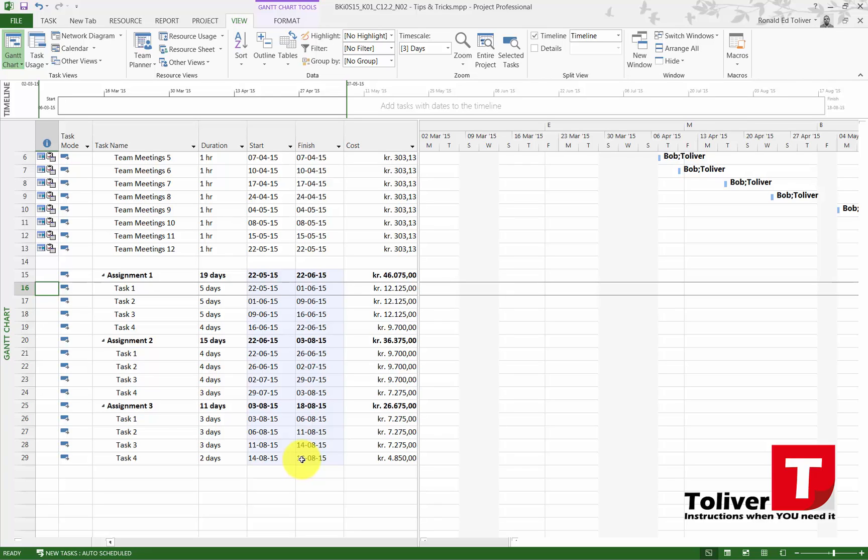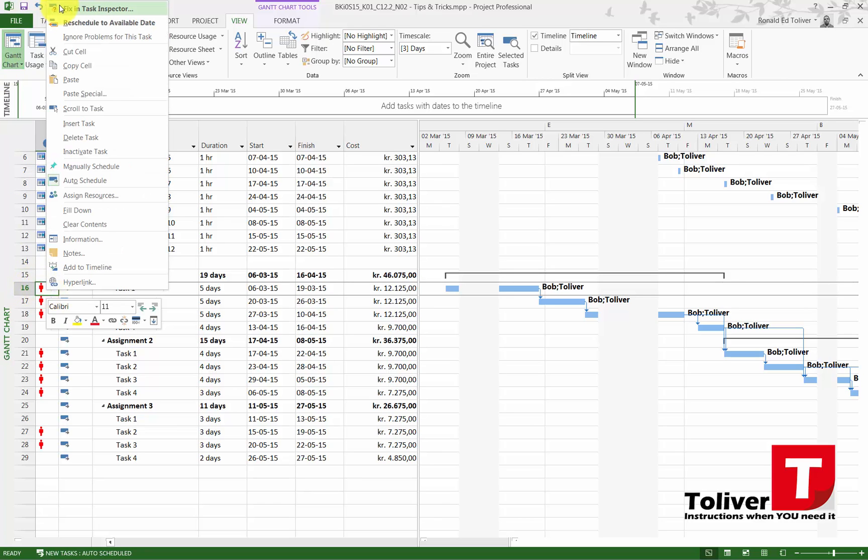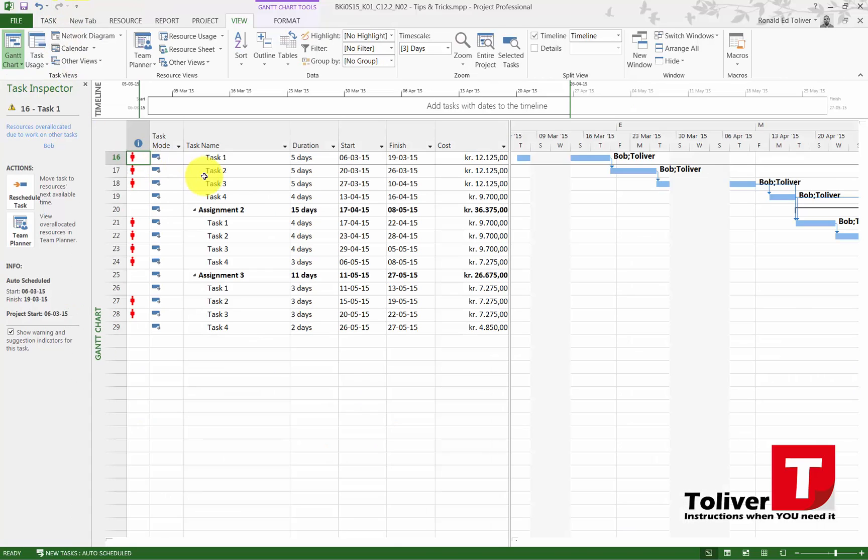I'm going to undo that because again I have an end date based upon my overall time plan. The other way was I could fix in task inspector and here I could move tasks to resources next available time. Again, the problem is it will push this end date forward, or I could view in the team planner.